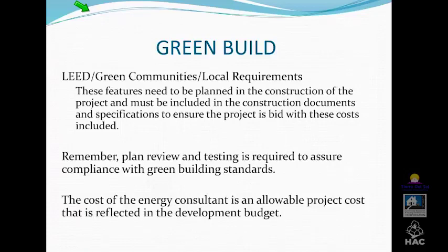You will also need an ALTA survey of the property, and there is handbook guidance for that. Again, this cost can be reimbursed at closing. And an appraisal. The appraisal is ordered after the comprehensive needs assessment is done and you know how much your reserve is going to be.